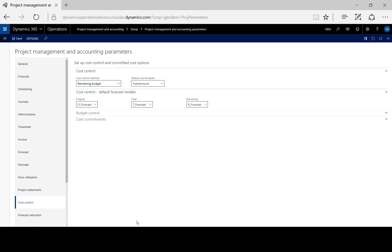When you change these global settings, they apply only to new projects. Existing projects are not affected.